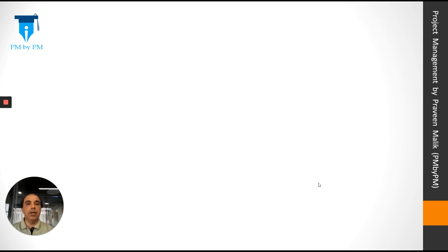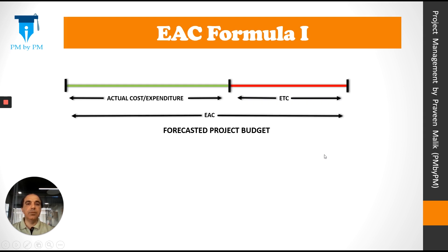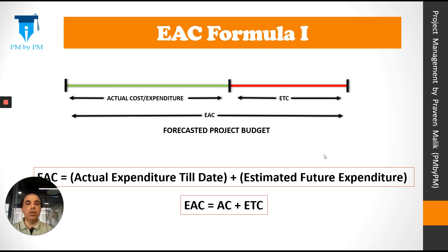Let's look at a formula for calculating EAC. You will notice that EAC is equal to expenditure till date plus estimated future expenditure. So our formula could be: EAC = AC + ETC.